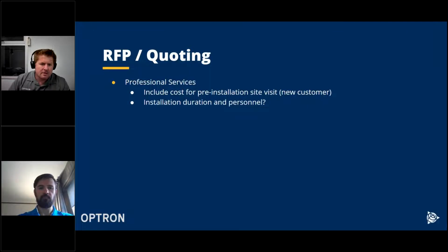We need to look at your installation duration and personnel. It's always quick to say, yes, I can give you a quote quickly. There you go, installation is included. And you maybe costed for 2 days of installation. And when you start actually planning the installation, you see, but this is going to take like 5 days or so. So you need to be clear before you do your quote that you know exactly, or more or less, how long the installation will take.